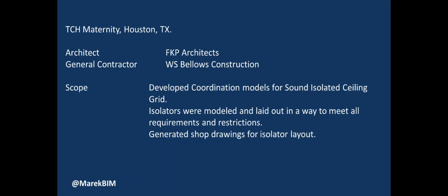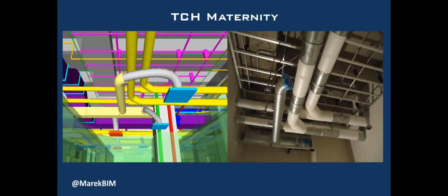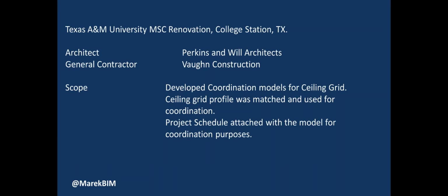TCH Maternity in Houston, we developed a coordination model. In the beginning, most of the stuff in Houston and around was just 1 room, 2 rooms, just some areas where there were some issues. So we had sound isolators that we needed to install in a heavy MEP area, and we used BIM to create the isolators, submit it to the sound engineer, have him approve it, and once everything was approved, we went ahead and built it. Saved a lot of time and effort in doing that.